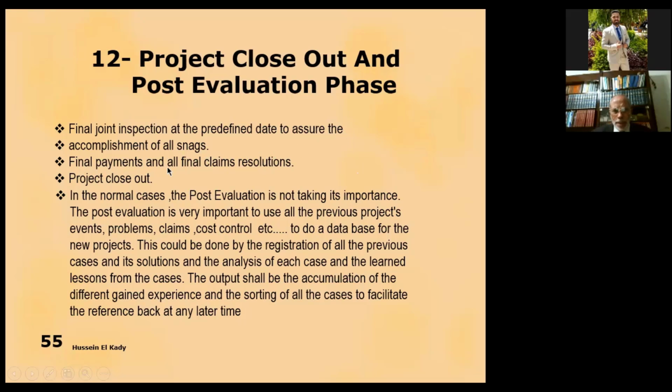Final payments and all final claims resolution. In normal cases, the post evaluation is not given its importance. The post evaluation is very important to use all the previous projects' events, problems, claims, cost control, etc., to build a database for new projects. This is one of the very important issues of a project.